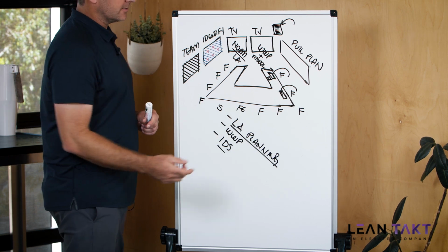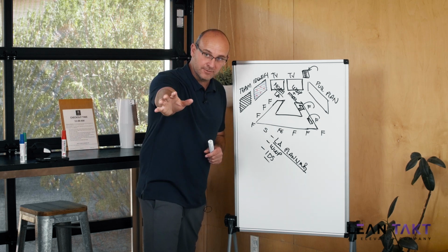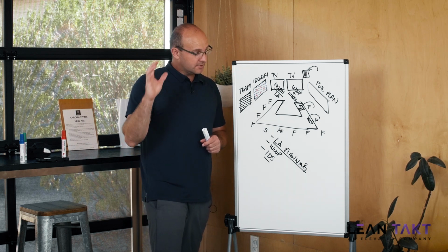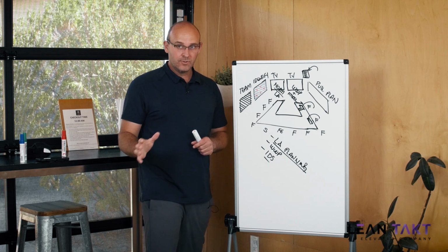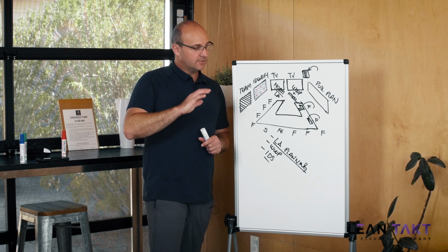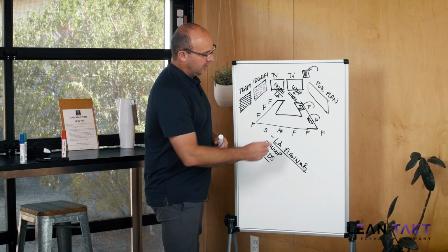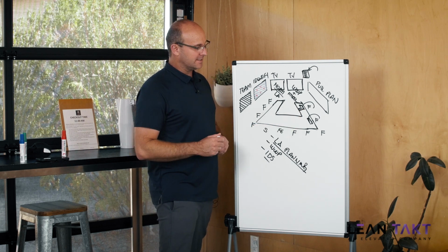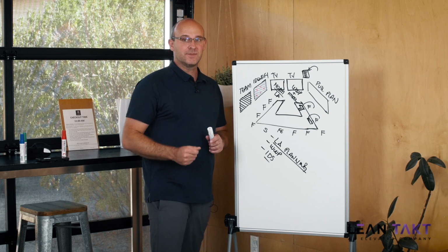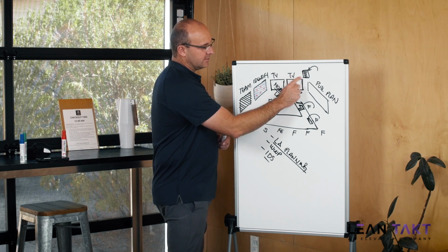Ask the trade partners, hey, look at this look ahead that has come from your pull plan, that was an ad hoc meeting that you already weighed in on and bought into. It's a part of the Last Planner System. This is your production plan. Look out the next 6 weeks, please, for the next 5, 10, or 15 minutes, and find something, a constraint, a roadblock, an issue where you don't have all the things that you need, okay?